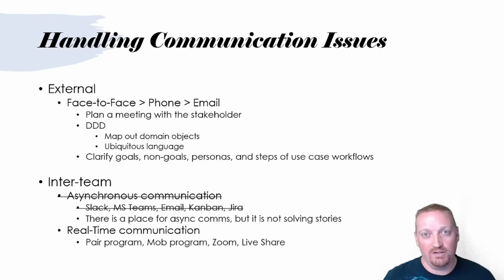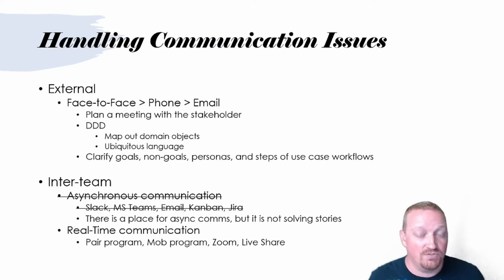And also, there's no such thing as a 0-point story other than a spike, because a 0-point story means, why are you even doing it? If there's no effort or there's no difficulty to the problem, then anybody can do it. It really shouldn't be on the developers to do that thing. It should be on somebody else. It really should.